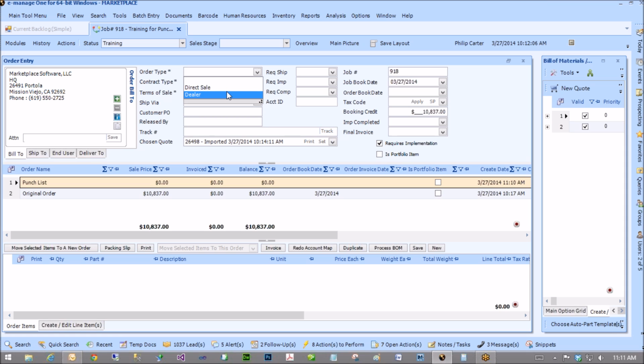You never want a customer to call you and say you forgot something. It's in your backlog until you remove it physically if it's a zero price. Also, it's going to be on your to be scheduled, so it's going to be there until somebody schedules it. This is a way to keep it in front of you because you're all looking at the current backlog all the time.